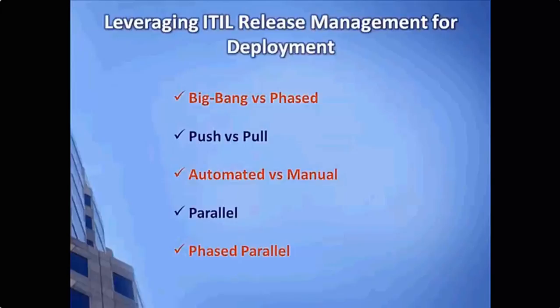Chances are that you may have a number of initial wins and process solutions that need to be deployed. A disaster would occur if each implementation team deployed their assigned solutions separately. You may have lots of cases where people end up with conflicts, things going out ahead of time when they shouldn't have, or maybe just simply inundating your stakeholders with too much change all at once. Therefore, it's highly recommended that some form of transition approach be employed to effectively package and roll out your solutions.